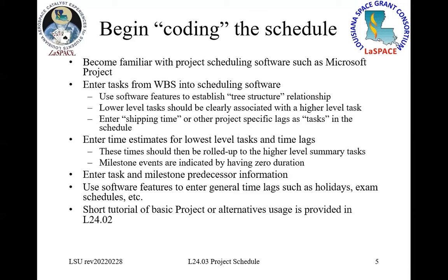So for example, when we're talking about these lags or shipping time, ordering would precede shipping, and installing would follow the shipping. So these would be predecessors. You'd identify that.